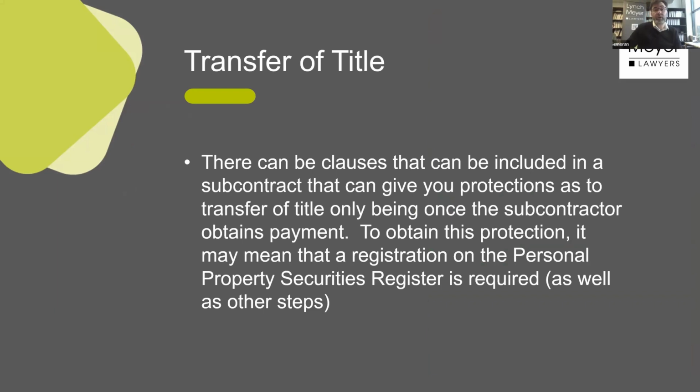Transfer of title. Sometimes I like to include terms that say that what I provide to you will only be transferred to your ownership once you pay me. And to obtain this protection, we get into the weird and wonderful world of personal property securities register type issues, where you might have to register your security interest in the items. When I talk to contractors about this, usually their eyes glaze over and they're not that interested. But if you think that you've got a lot of items on site that aren't paid for, that sit on site for an extended period of time, I think it's important to turn your mind to this.